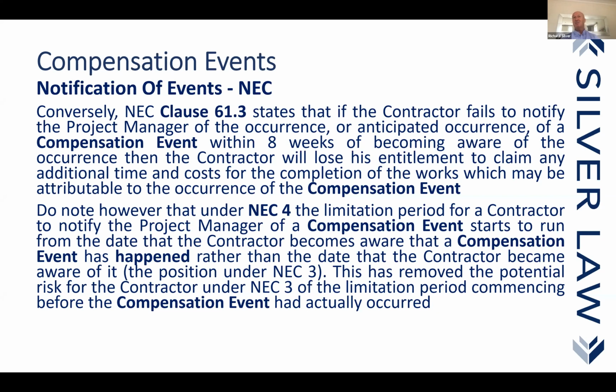So effectively, the contractor, because of this request to meet a different code of practice in the site meeting minutes, was now required to carry out a lot of extra work. The contractor didn't pick this up, didn't issue a compensation event notice, and didn't submit quotations. Equally, the PM, other than recording it in the meeting minutes, didn't issue an instruction, early warning notice, compensation event notice, or anything. As the job progressed, some 6 months later, the consultant picked up that they were doing all this additional work and sought compensation events and applied for all of this amount of extra money, which was quite substantial in view of the size of the project.